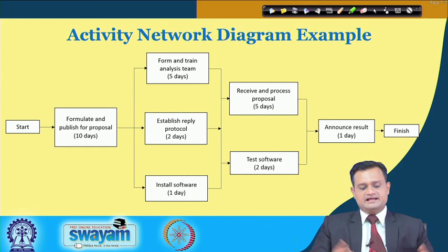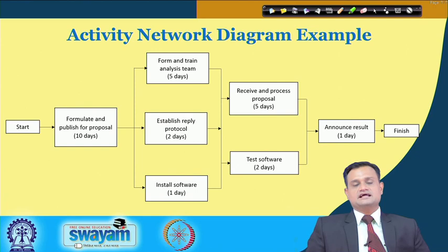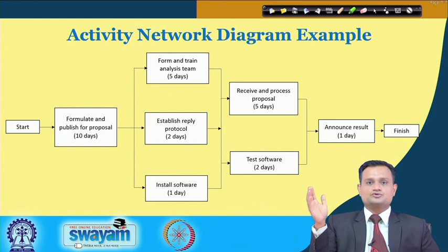Then establish reply protocol, 2 days, install software. Subsequently, once these 3 tasks which are parallel are completed, you can proceed for receive and process proposal, 5 days, and test software. And finally, you have the announcement of the results and finish. So this will give you a systematic pathway with the milestone to see how your project will proceed and in what way you should respect the predecessor-successor relationship in order to complete your project within the stipulated period of time.